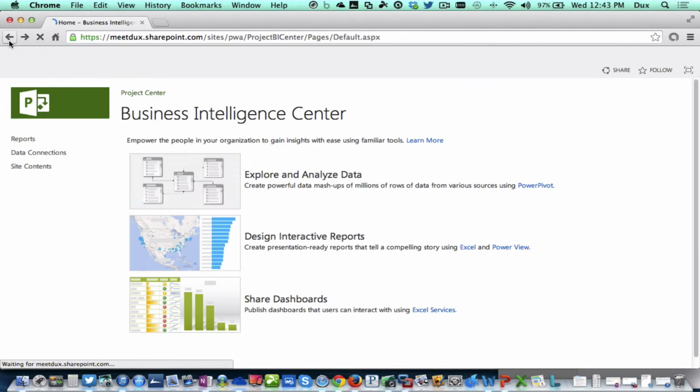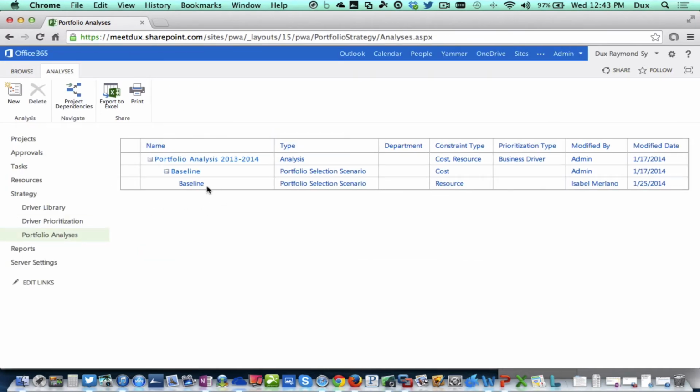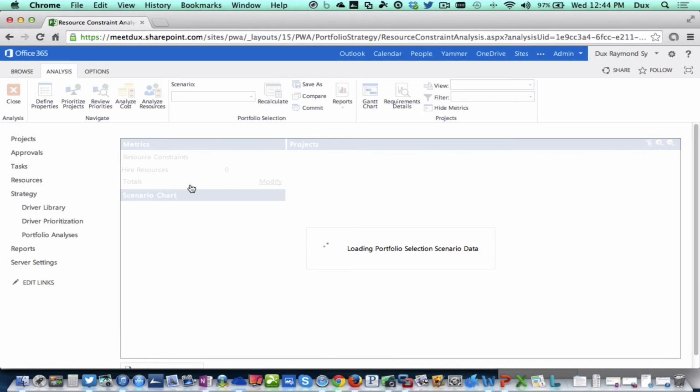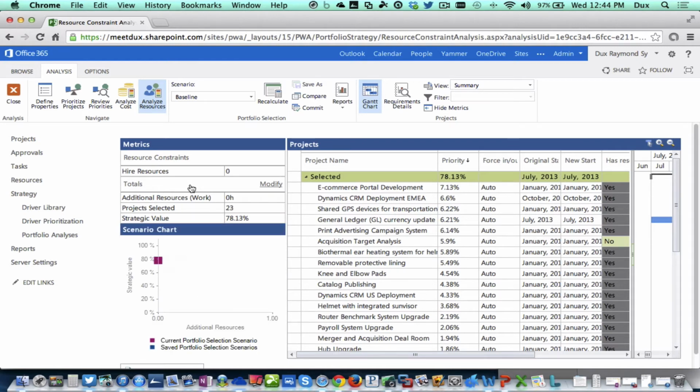Another type of reporting goes into higher level strategy. Let's say at the start of the fiscal year, the CIO, because of how the economy is, sets strategic drivers and priorities. We can say we're only going to work on projects that help us save money and make money over $1 million, whatever. So as a project gets put in, the project manager can put in that this project will help cut costs, this is the ROI, whatever.